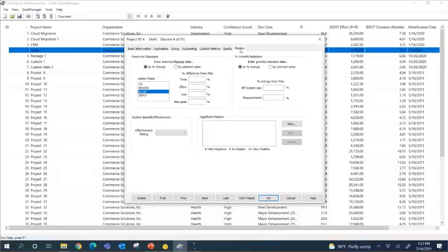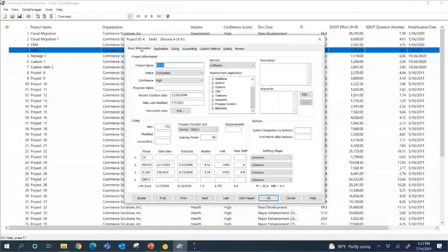So once that project or release or delivery has been completed, were we 5% off? Were we 10% off? That way we can manage the uncertainty more effectively on our future estimates, okay? So if we know how far we were off originally on the previous work, we can use that information to give ourselves a little more buffer when we're planning going forward. Okay, so keep that in mind. So this would be a place that you could capture your historical data.